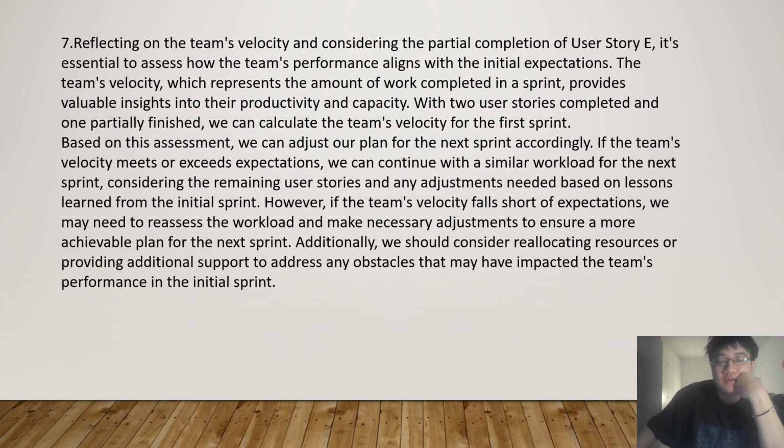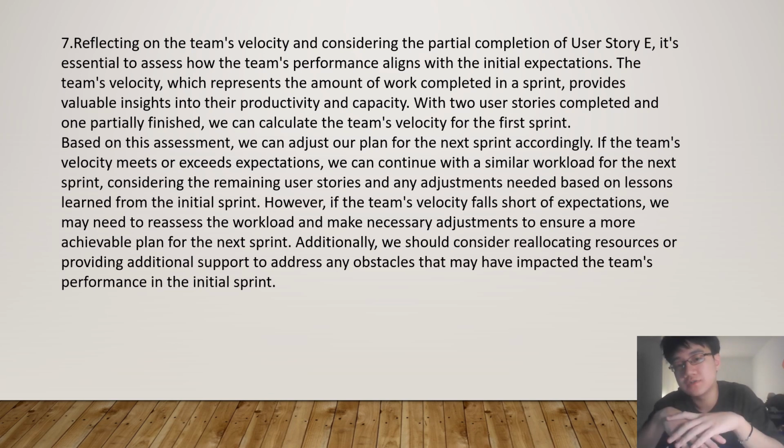Reflect on the team's velocity and consider the patterns of the user stories. It is important to assess how the team's performance aligns with the team's velocity with respect to the sprint work completed, which provides valuable insight. With two user stories completed and one partially finished, we can conclude the team's velocity for the first sprint. Based on this, we can adjust our plan for the next sprint.